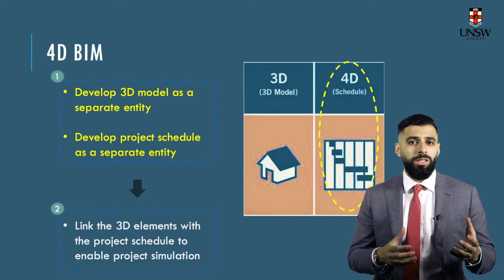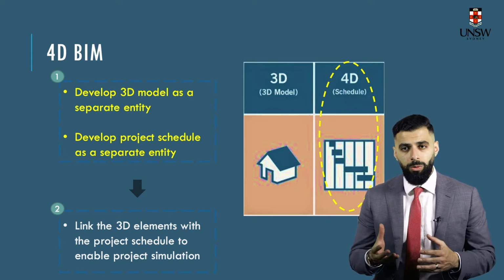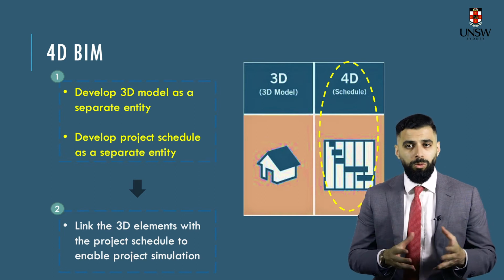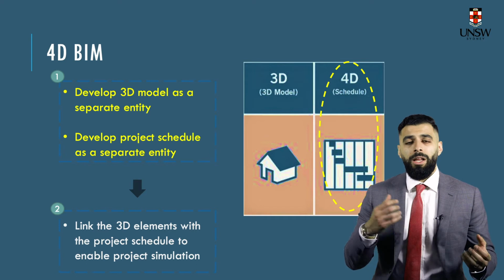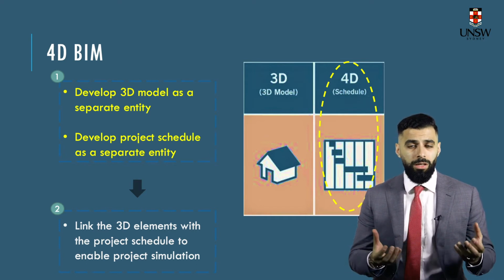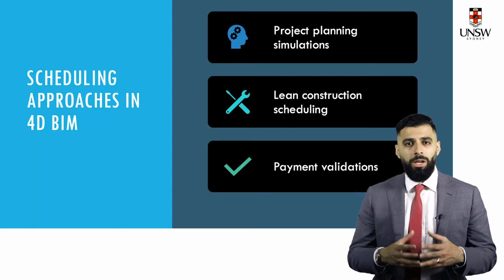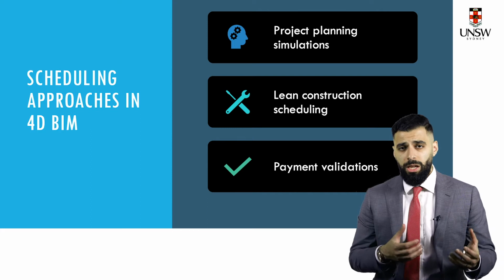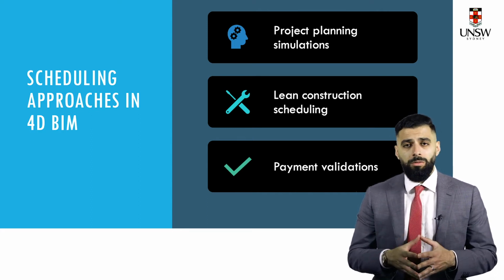A main point to consider is that the integration of the construction schedule and the BIM model is made possible through a link between the objects in your BIM model and the individual construction activities that are present in your typical construction schedule. Now let's have a look at some of the scheduling approaches that can be made possible via